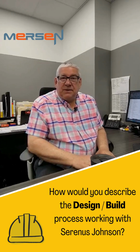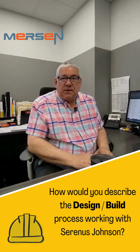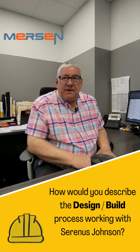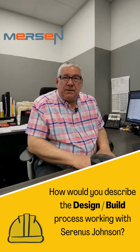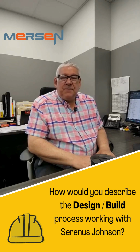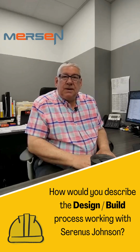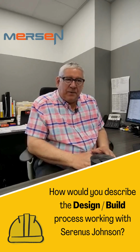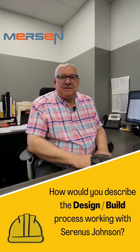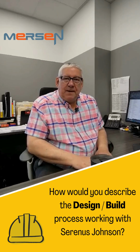They would go back, put together the proposals, come back to us, and make a presentation. We'd have more dialogue. With most of our projects, they came in at a higher amount than we were prepared for, partly because of business conditions and material costs. But as Joel likes to put it, don't worry, we have value engineering. We would go through and decide what things were important and what things we could change. Could we downgrade the type of countertops, or by changing the color of the carpeting, could we save some money? So we would work together to get to an agreeable price for both of us.